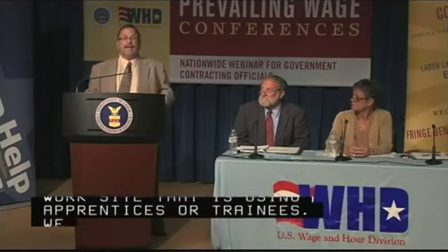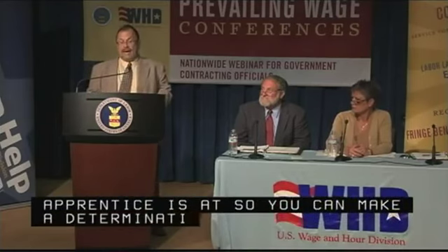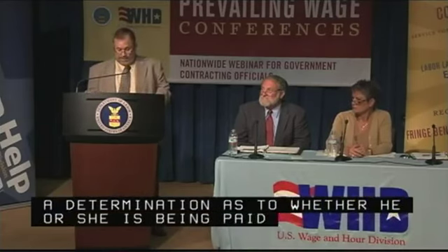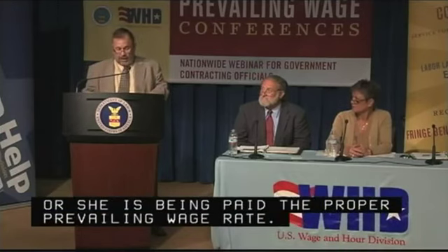We think it's a great tool to ask for the apprenticeship plan as well as the individual registration form so that you can make a determination of what the ratio requirement is as well as what level that particular apprentice is at, so that you can make a determination as to whether he or she's being paid the proper prevailing wage rate.